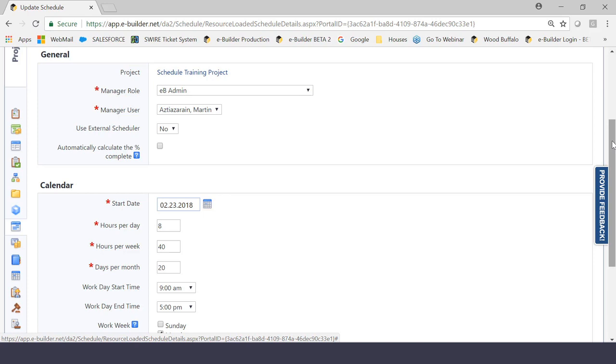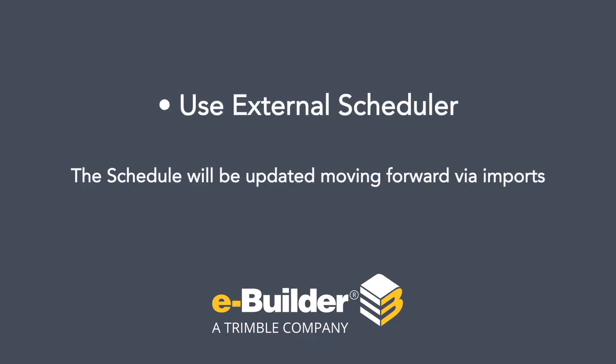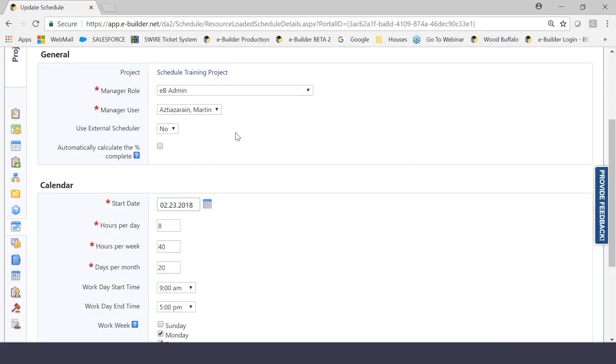The next setting that says Use External Scheduler is going to offer you two choices, yes or no. So let's describe what an external scheduler is. If you say yes here in this field, what you're basically declaring is that the schedule will be updated moving forward via imports.